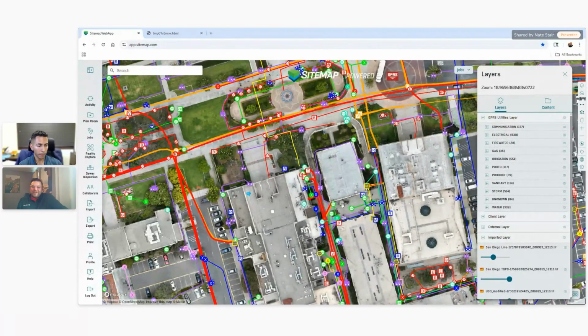Sure. I think in our conversation we had mentioned, you talked about the gas line, and just the massive amount of irrigation and even other utilities. But I think you'd mentioned something like possibly $50,000 of possible damages from having to hit something like that, having to shut it down, find it, plug it, repressurize it, and all that. So there's massive costs involved when you're dealing with poor information.